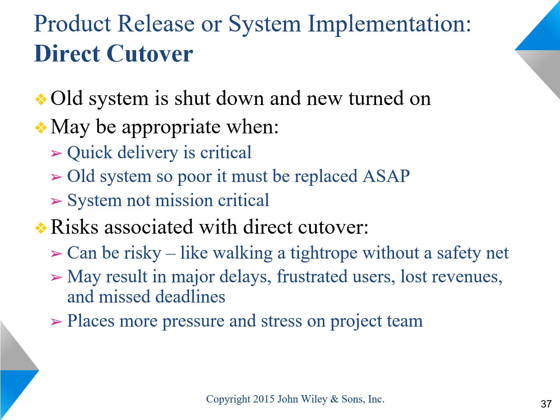When you switch over to the new system, it would be very hard to then go back to the old system and re-input all the information that the business has put into the system during that period. So it's a major risk for a critical system, but for a system that is not as critical, it may be fine. Clearly, because of this risk, it puts a lot of pressure and stress on the project team.